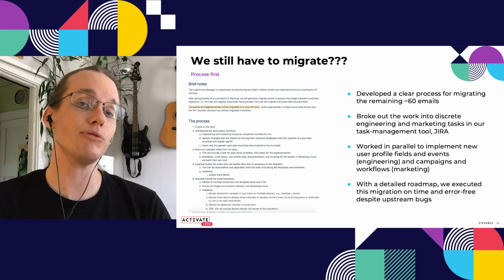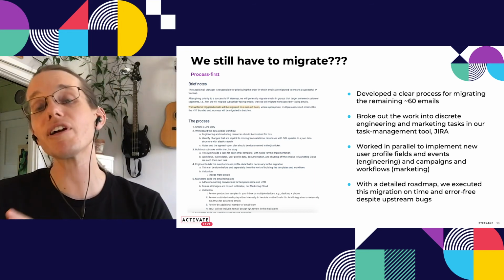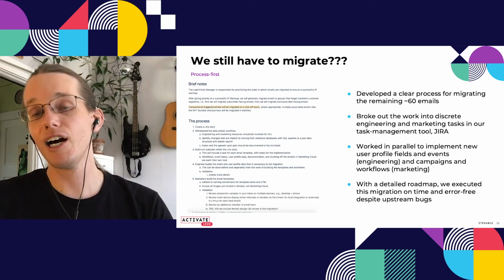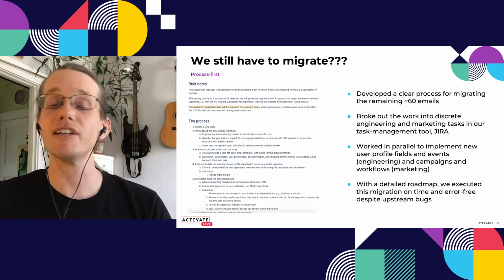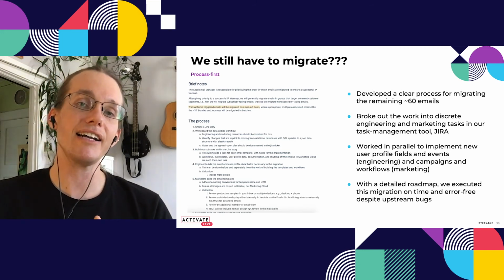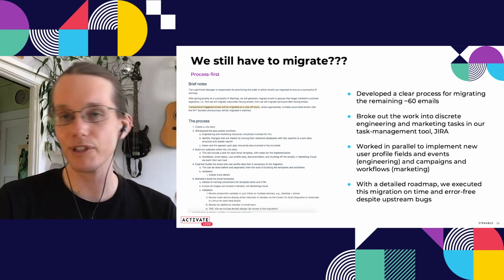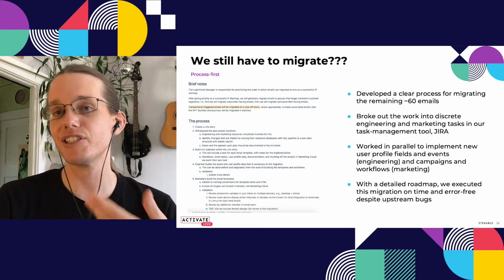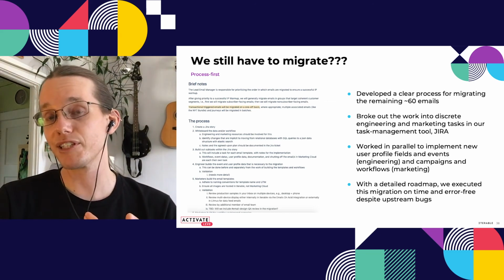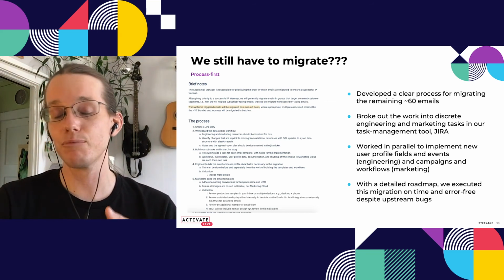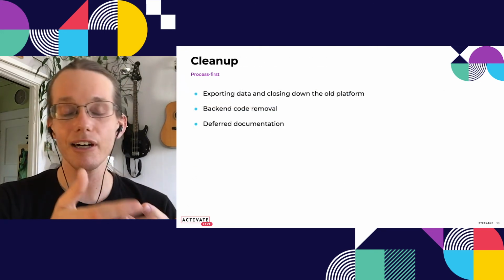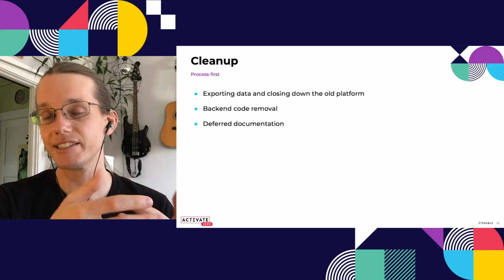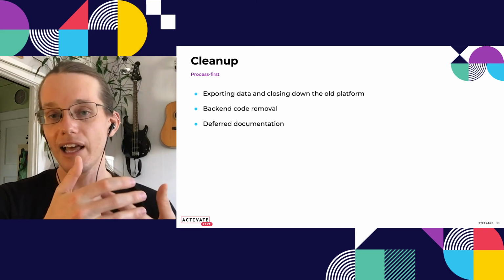But because they had been able to work ahead and separately of the marketing side on migrating emails, we still came in actually a month ahead of our hard deadline, because we had done so much upfront work to define our work. And that is one thing I really do encourage, not just for migrations, but in general. That's been a major professional learning over the last year, is the importance of good project management. So we completed our migration actually a month in advance of our true hard deadline.